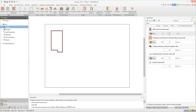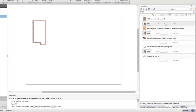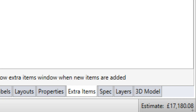As you can see from the figure at the bottom right hand corner of the screen, BuildingWorks is building your estimate as you draw each element of your design. Here we can see the cost of the brick and block cavity walls. Costs are dependent on the material, labour and plant rates in the software — as prices can vary, it's important to check the rates match what you pay. Costs reflect the chosen specification and quality of material selected, and also include a wastage allowance.